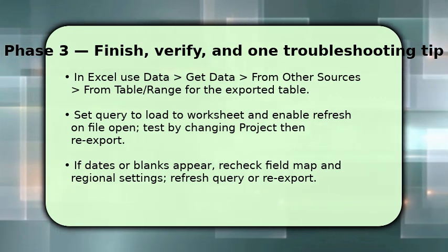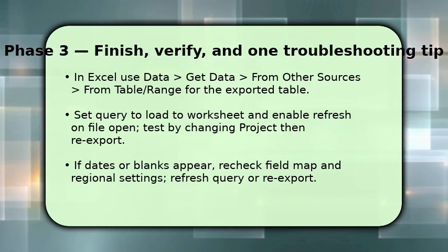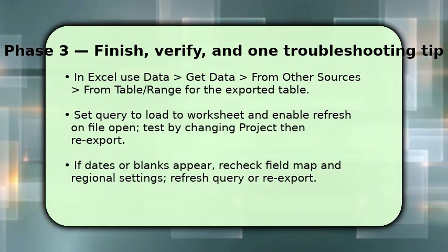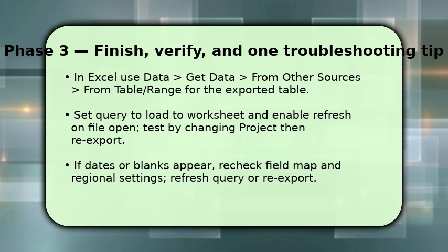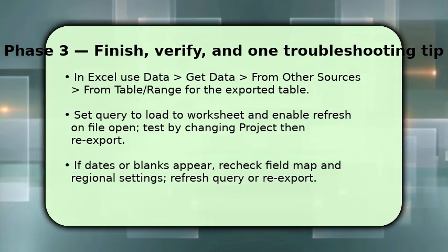If you get blank cells or shifted dates, make sure the export map matches fields exactly and that regional/date settings align. As a key tip, always test with a small change, then refresh.